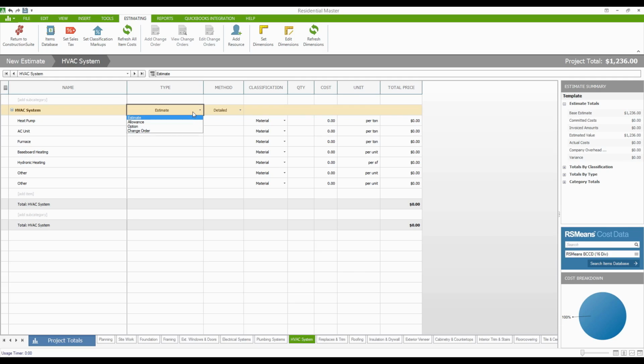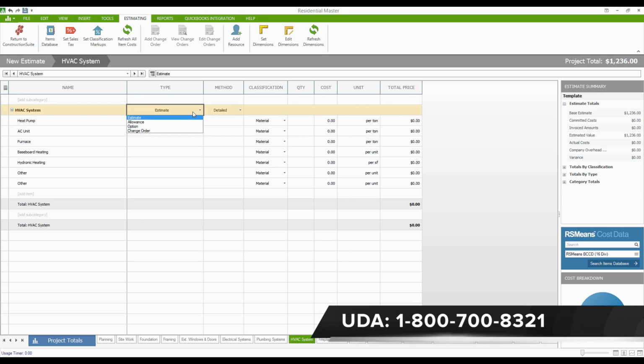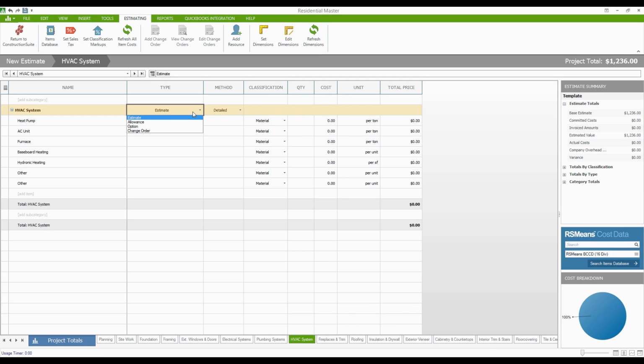Options, on the other hand, are things that are not going to factor into the contract value unless the client selects to use that. The deck would be a prime example that we were talking about earlier. I have, as an option with any house that we build, a deck package included, but it's an optional addition to that contract. If the customer doesn't want a deck, or they want somebody else to put together the deck or something like that, that's fine. They can always do that through somebody else at a later date. You know, no harm, no foul. It's not part of building the house. It's not a requirement here, so we might throw it in there as an option.